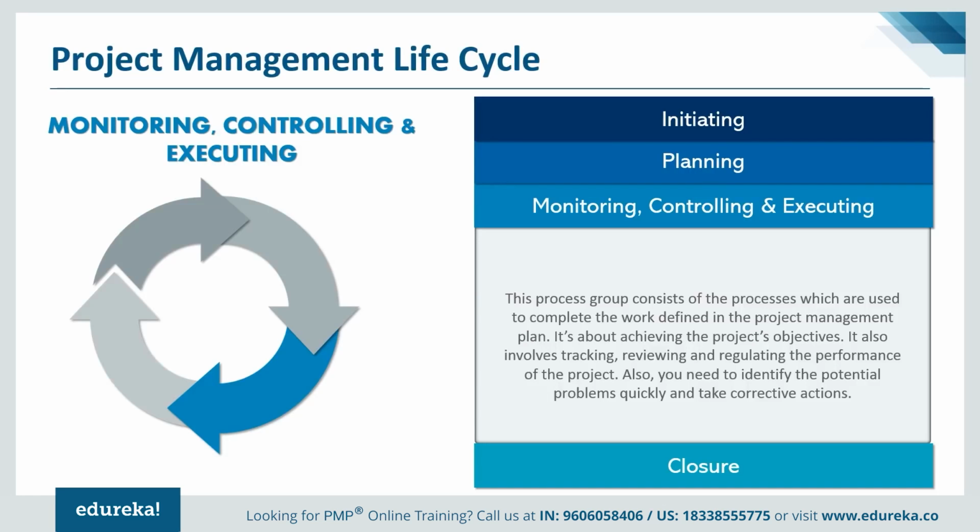At the same time, in monitoring and control, the one big thing we do is compare our project management plan and the current progress to understand: are there any gaps? Are there any items which call for an action now? This action could be initiated in the form of a change request, very commonly called a CR in many organizations. So the process of initiating a change request and giving it to the change control board is also done in the monitoring and control process group itself.